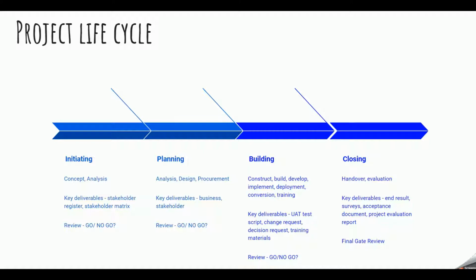Right? So without having all the stakeholders agree on what their roles and responsibilities are, oftentimes projects end up getting delayed because there's lack of communication or understanding of, oh, we were expecting something from you, and then the business coming back and saying, well, I didn't know that you guys needed something from me. I wasn't aware of this. So oftentimes, lack of communication and lack of clear roles and responsibilities lead to failure of a project. This is why it's critical to come together and understand what exactly everyone's supposed to be doing.